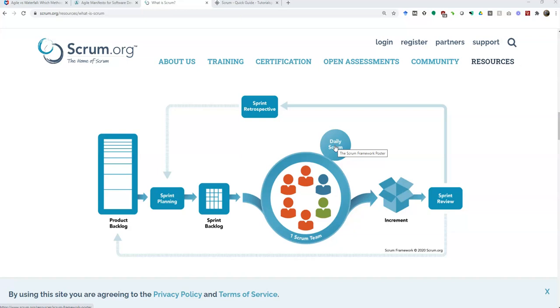And the way it works is the product owner, the Scrum Master, and the development team come together. And each person, particularly the ones on the development team, will state three things. This is part of the, what's the word? It's not catechism, is it? Like the call and response. I keep comparing it to religion, but they'll state three things. This is what I did yesterday, just in general terms. Like what I've accomplished so far, basically, since the last time we had a meeting, whenever that was. So let's just call it yesterday. So this is what I did yesterday.